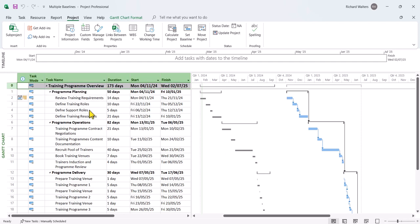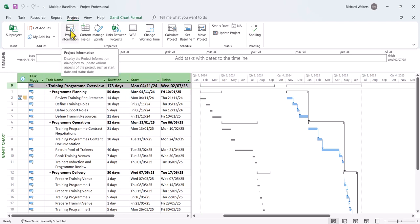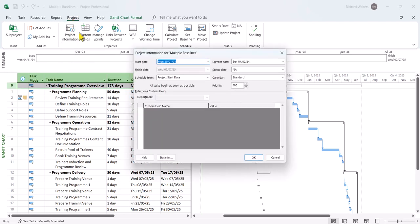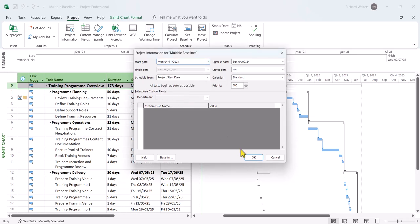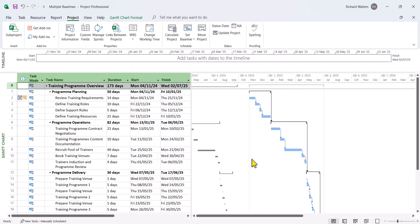So first of all, before we set them a second baseline, we're going to change the start date to the date that we can now see is the best date we can start this project on, which is the 4th of November. And then we're going to set a new baseline to agree from that point forward. So I'm going to now go to the, on the project tab, project information. I'm going to adjust the date to the date in November, because that's the best we can do right now. It's the 4th. Click OK. And we can now see the blue bars have aligned to the 4th. And now I'm going to set a baseline.